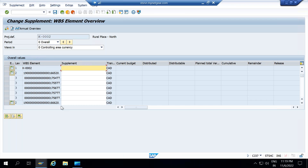In CJ37, you enter just one project definition and press enter — it shows only one project. The difference between CJ36 and CJ37 is: in CJ36, you have the option to enter WBS elements from different projects and enter the respective supplement amount. In CJ37 — supplement in project — you work on the same project across different WBS elements. Sometimes interviewers ask about this difference: both transactions supplement the budget, but CJ36 allows WBS elements from different projects, while CJ37 is for different WBS elements within the same project.